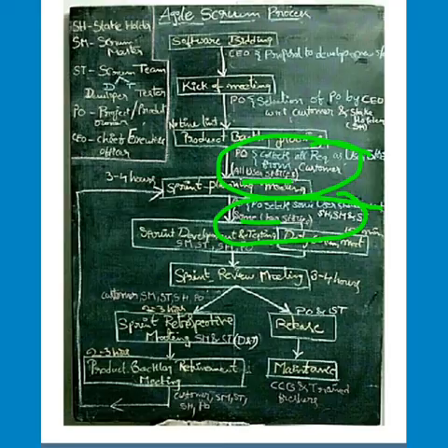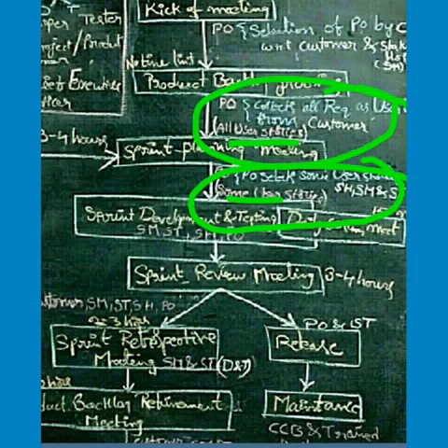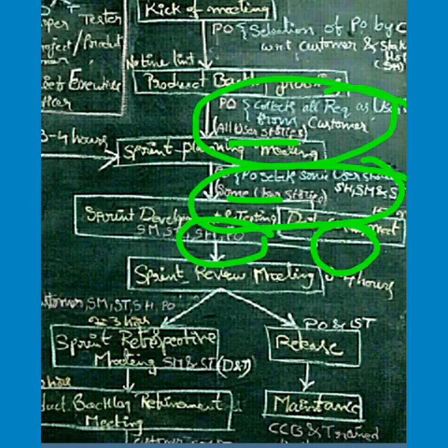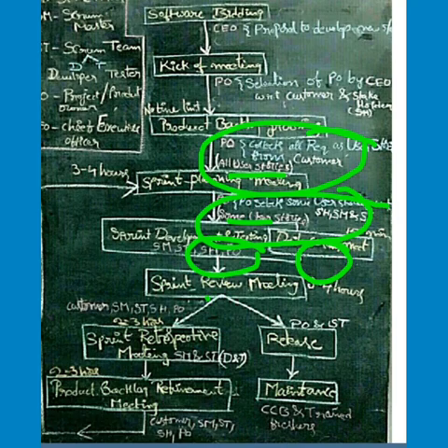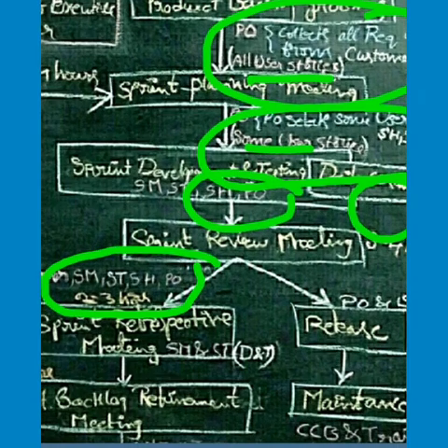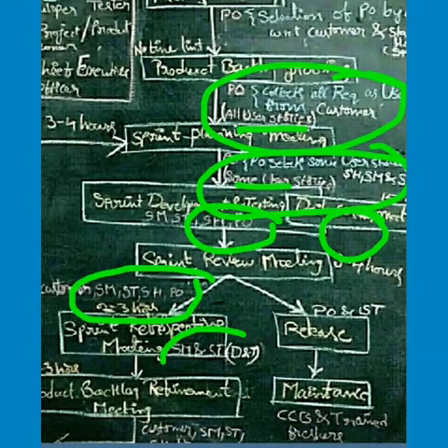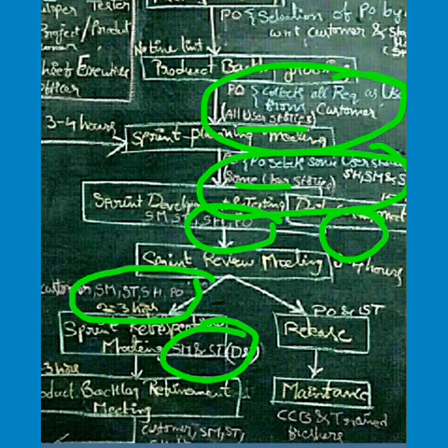Then you have to test the sprint. You have to perform test execution until the bugs are fixed, until the build is a bug-free software. In the daily Scrum meeting, you have to provide your work status details. Then in the sprint review meeting, you have to participate to collect the feedback from the customer. You are also responsible to participate in the sprint retrospective meeting